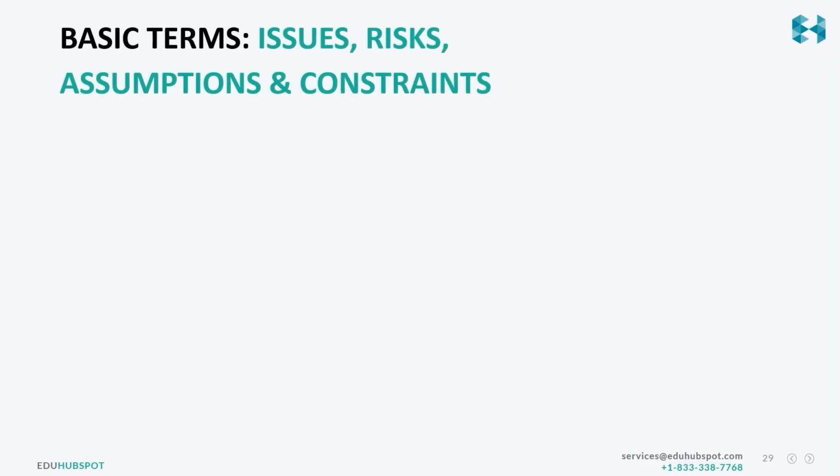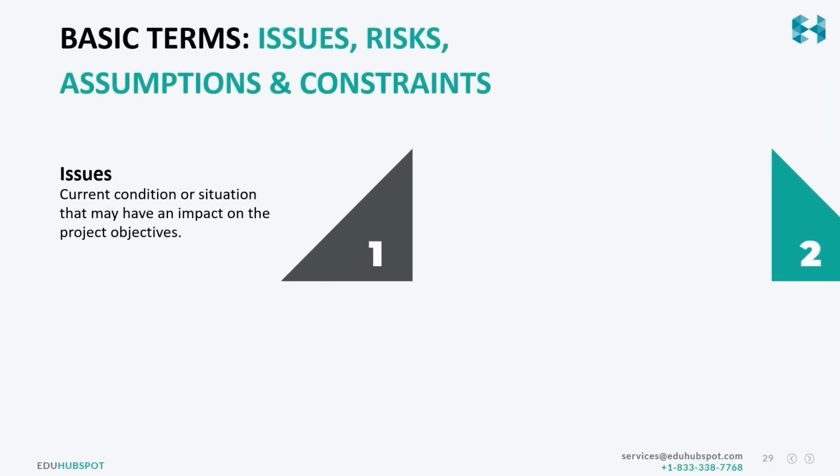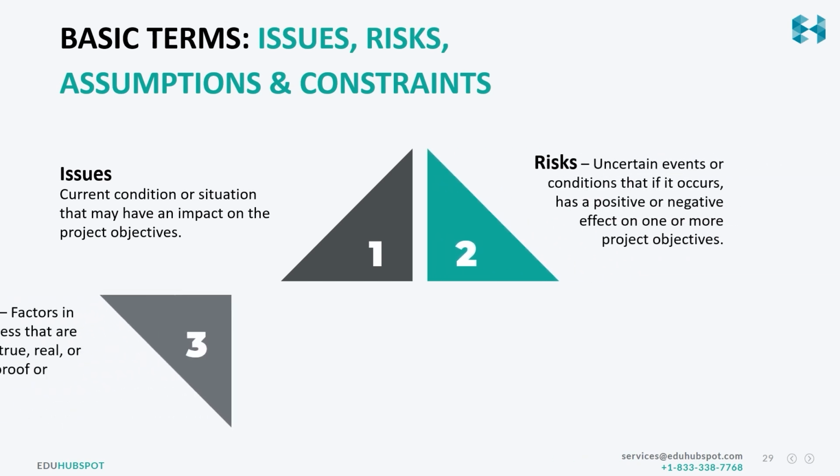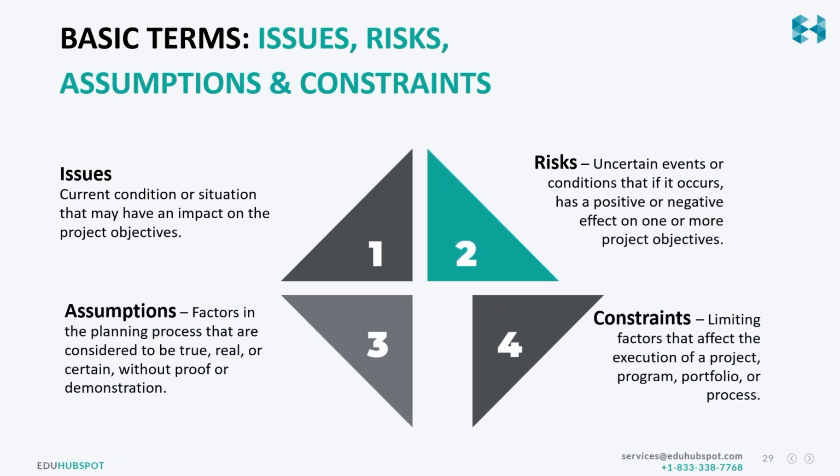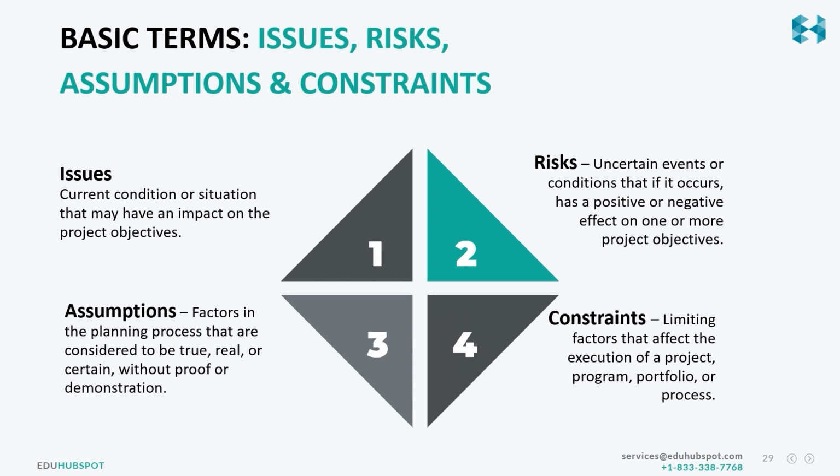Okay. And last, some of the most common terms which we will be using throughout this course are, first, risk and issues. The difference between risk and issues. Risk: something which may or may not happen. Issue: something which has actually happened. Now let's talk about risk. While I'm making the pizza, there may be a risk that the base becomes too hard. There may be, right? Or maybe not. So it's a risk on my project.